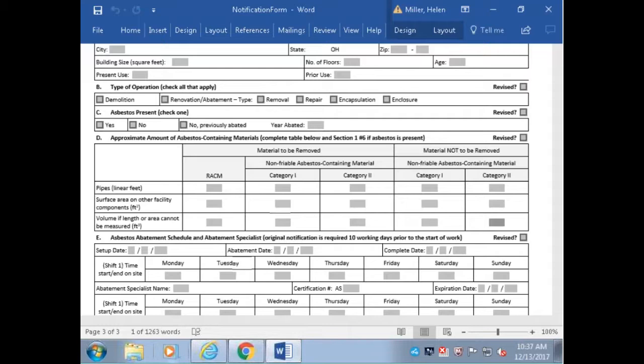Okay. Will RAPCA still require a work plan up front and a notification no longer is submitted directly to RAPCA? Well, that's a great question for the local air agencies. They'll have to decide if there's anything over and beyond that they want to continue to receive. They have the right to do that, but the Ohio EPA rules do not require that a work plan or a building inspection report or anything are submitted with the notification. So that's something that you'll have to work with RAPCA on if they want to see a work plan, if you want to give that plan to help facilitate their inspections.